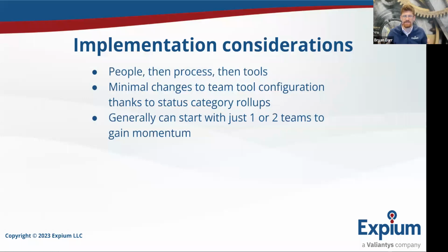So basically what I'm saying is you can leave the team configuration as is. There's things like status categories that help statuses roll up in reporting, no matter how the team is configured, as long as they're configured correctly. So if we start standardizing at the Epic layer, this allows management to provide prioritized and estimated work down to the teams. The epics can then be tagged with customers, products, whatever else you need in order to build roadmaps off of them. And then those epics tie to higher level initiatives, allowing company strategy execution.